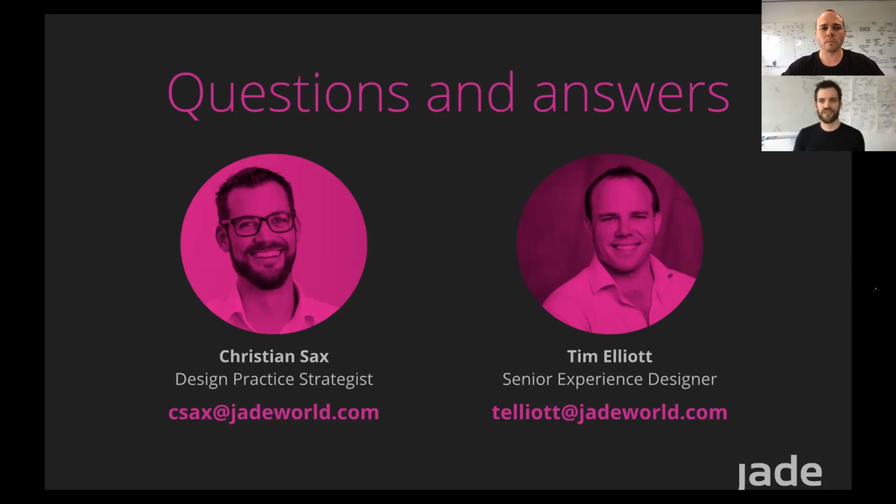Yeah, to add to that one around the scope, as I guess from Monday onwards, you only have one day. So it comes back to what is the most critical or the riskiest or the most potential element of this user journey that you want to test? So usually it's something, as Tim said before, it's something new, it's hairy and scary. So this is the one thing we need to test. And if we can fit that in one day of prototyping, then that's the job done. It does not necessarily have the full journey, but the riskiest element has to be in the prototype, and that's what we focus on. And we make this very clear throughout the process that we have to cull down if required.